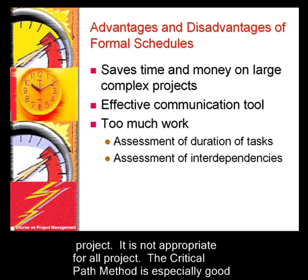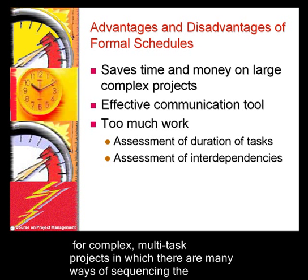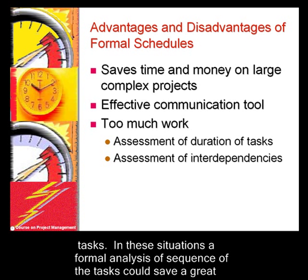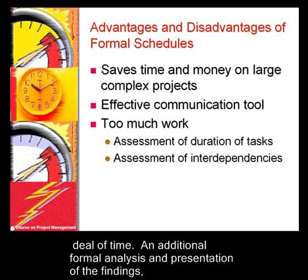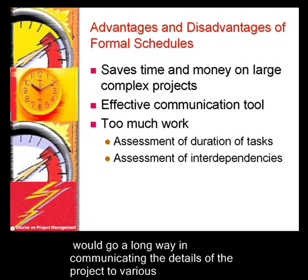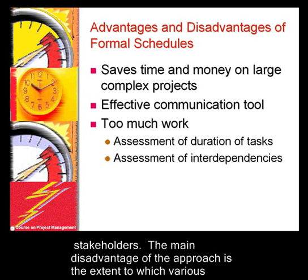It is not appropriate for all projects. The Critical Path Method is especially good for complex, multi-task projects in which there are many ways of sequencing the tasks. In these situations, a formal analysis of the sequence of tasks could save a great deal of time. An additional formal analysis and presentation of the findings would go a long way in communicating the details of the project to various stakeholders.